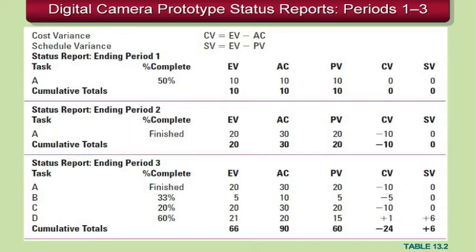In fact, you'll probably want to not even begin setting up the first report until you're at least 20% done with the project, because early on in the project there's a lot more variances than hopefully later on. But the rule of thumb is probably 20% of the project in before the first status report. But that being said, let's take a look at what happens after period 1.